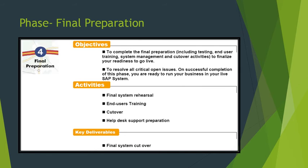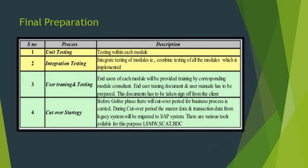Because testing should have begun back in phase 2, you do not have too far to go until go-live. During final preparation we are doing unit testing, integration testing, user training and testing, and cut-over strategies. After everything, we need to provide training to the client on how the system will proceed. If they are using another system or if they are not, we need to load all the data into SAP through different mass upload tools like LSMW and BDCs.